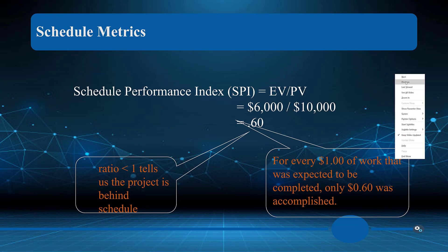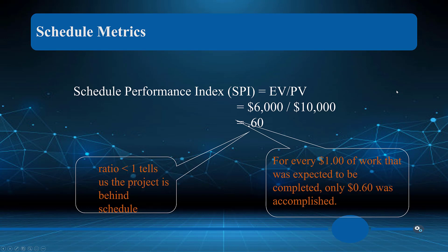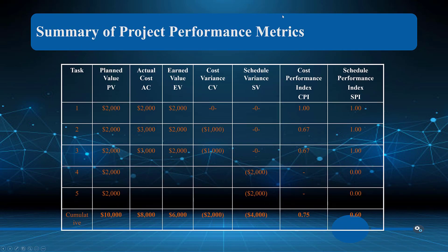The negative four thousand value tells us the project is behind schedule. When we calculate the schedule performance index (SPI) by dividing the same two numbers, we get 0.60 — meaning for every dollar of work expected to be completed, only sixty cents was actually accomplished. We're spending forty cents that is not providing true value to the project.